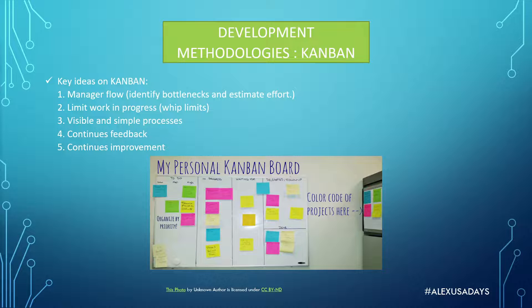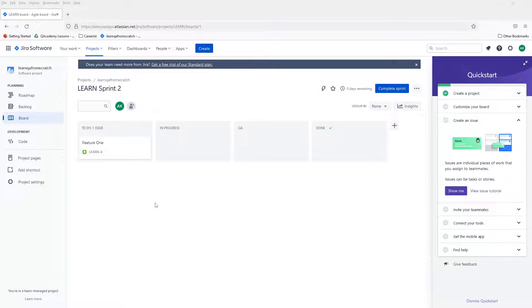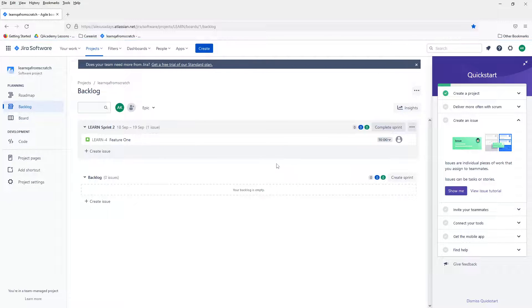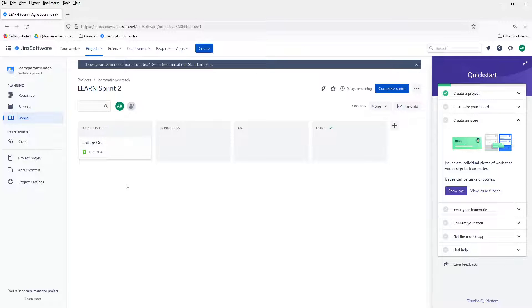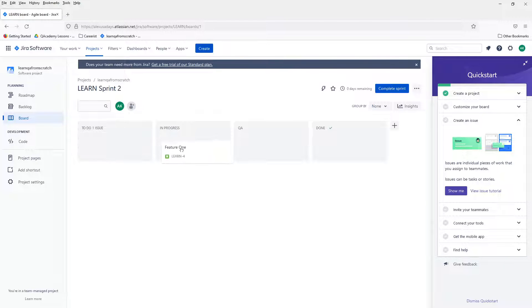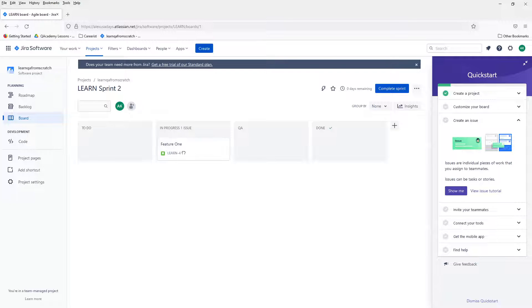Visually, the Kanban board looks like this — it's from the previous video where we had a project in Scrum. In Scrum, if you go into the actual board, it's essentially the same as a Kanban board. You have stories, tickets, and tasks in a backlog that gets selected for work, prioritized so the top priority goes first. You move tickets through columns — from backlog to in-progress. With WIP limits, developers can't work on more than, say, three different stories or features at the same time. Once you exceed three, the column lights up red so you immediately see there's an issue.